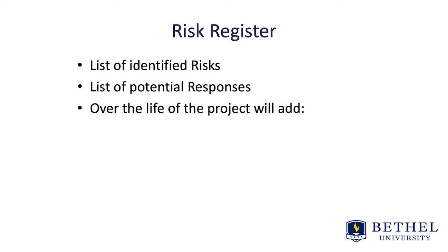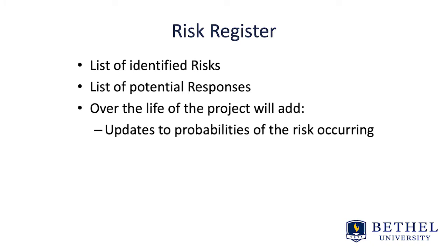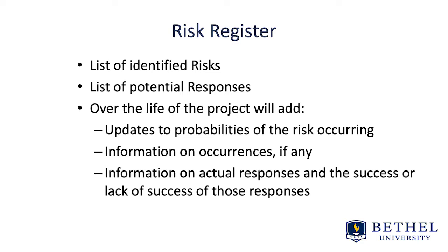And over the life of the project, you add updates to the probabilities of the risk occurring. You add information on occurrences, if any. You also add information on actual responses and the success or lack of success of those responses.